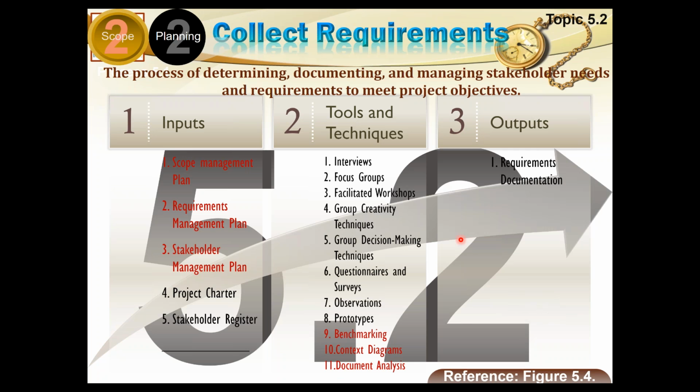Okay, we have got a large number of tools and techniques here, and I need to define these a bit. Now, when you go to someone to collect the requirements, how will you decide whom to go to and what to ask, and based on that how to analyze their data and how to go about it? It's very simple. If the audience you want to gather information from is very few, say 5 people or 2 people or 3 people, then in that case, I can directly go to that person for an interview. Maybe I can take time, I can interview, and I can discuss things out with them.